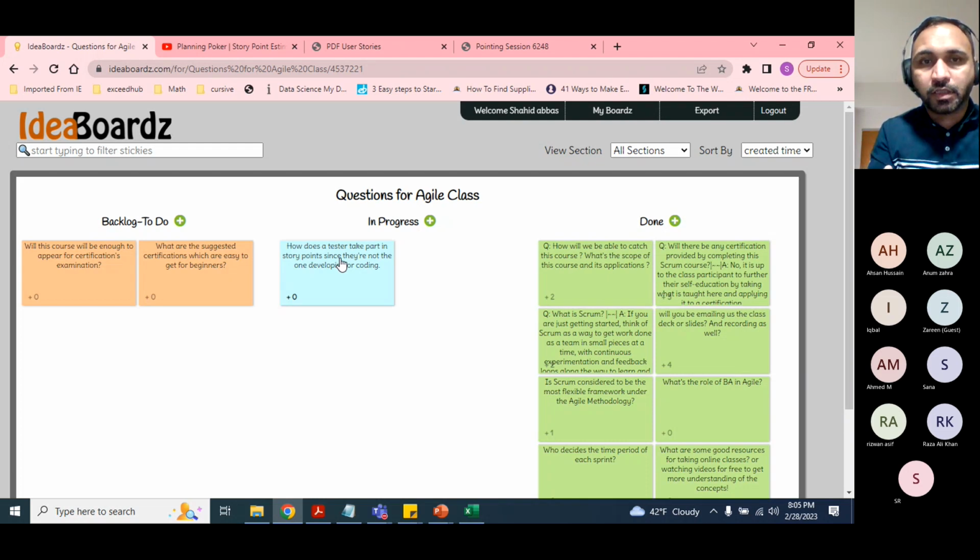That's why they raise those story points and come up with higher estimates. When they start those discussions, that's where the developers understand, oh yeah, you're right, because testing is more: you have to do so much heavy regression testing or other components testing as well. So it's not only testing that is influencing, but it's a piece that has more effort, one of the layers: development, coding and testing. That's how the tester takes part in story sizing. Not only the development, it's always a bag. When we were talking about do's and don'ts, that was also captured: don't estimate the story only from the coding side or only from the testing side. Bring them together, and they should agree.